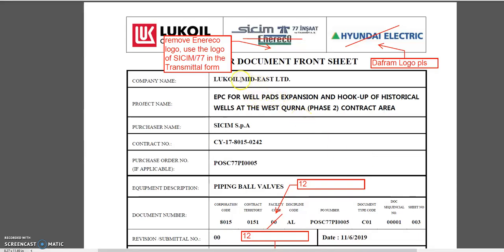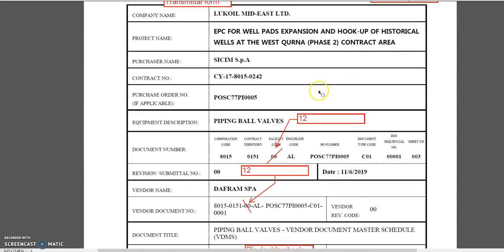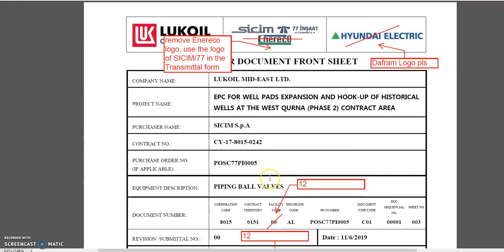Alright, now here we have the vendor documents, the C01 of DAF from SPA. In the cover page, CGM 77 in SAT and Enoreco — last week we learned that this is not the scope of work of Enoreco, so this is wrong. They have to change it — they have to remove and use the correct logo. In the transmittal form there is a logo, and they have to change this to the correct DAF logo.